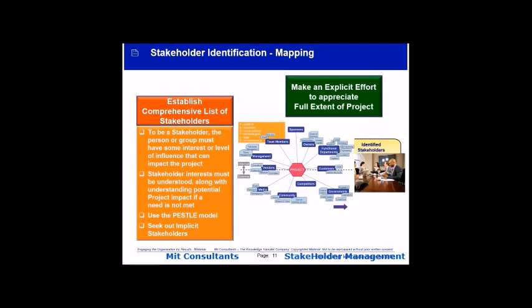And this will be the core team. I would very often also invite a sponsor because he or she can also give some insights as to what other organizational entities could be involved. So you develop a whole set of spokes around the project, and each spoke has terminal points. You can break that down to certain levels where you want to identify an individual with a name, okay? And by doing so, you can actually also relate how they function together.